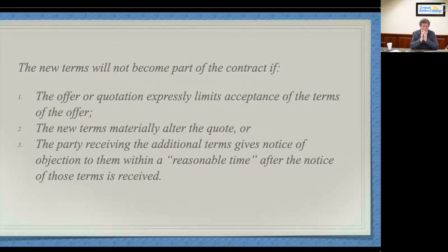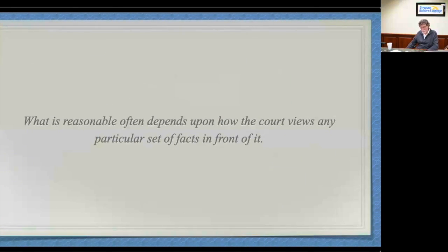Or the new terms that I try to stick you with are a material change, whatever that means, to the quotation. And we'll talk about a few examples of that. Or if I'm the guy sending you that nasty purchase order, within a reasonable time, you give notice of objection. So if you're a vendor and my PO includes terms, you've got to look at these things. Because you could get stuck to my terms unless you're lucky to have a judge say exception number two applies, if it's a material alteration of the quote. But when you get there, you're off in lawyer land.